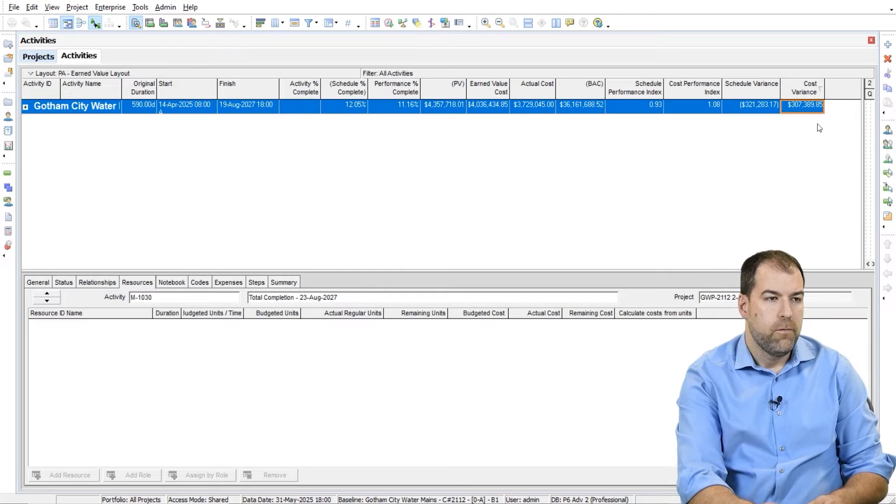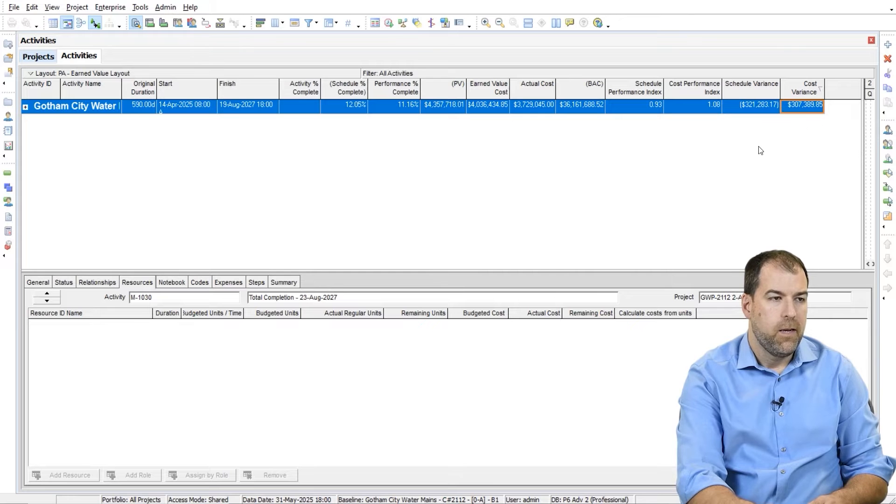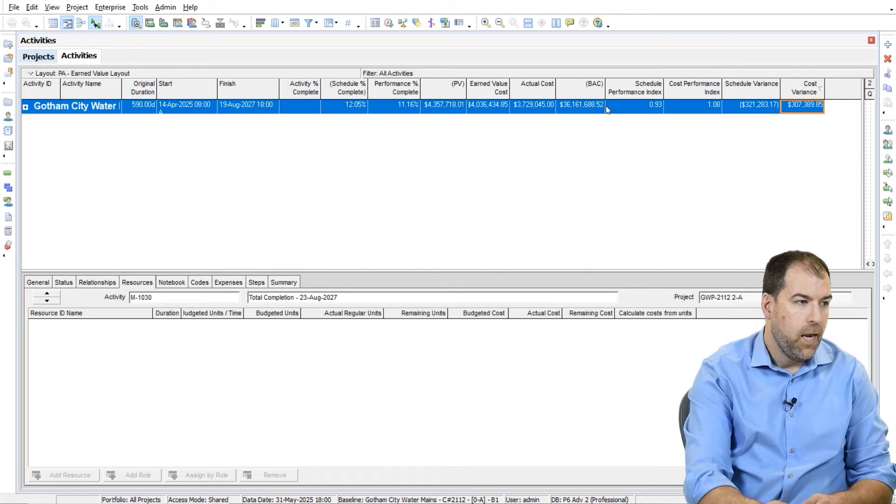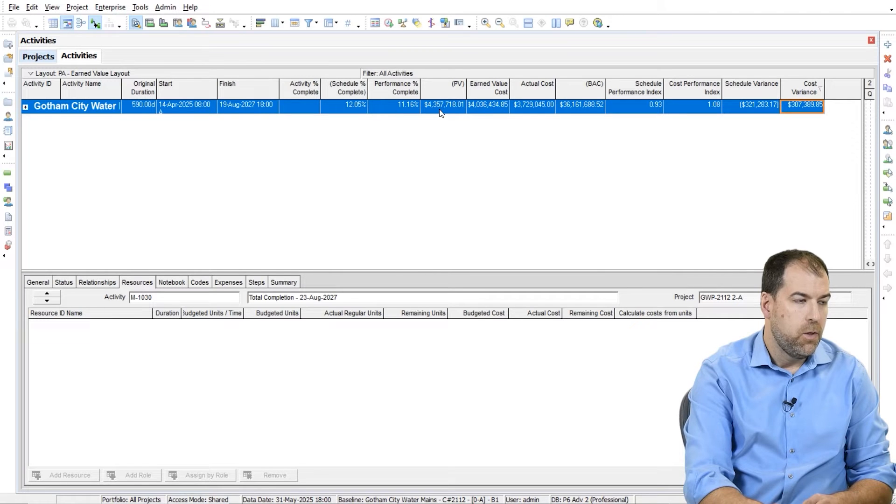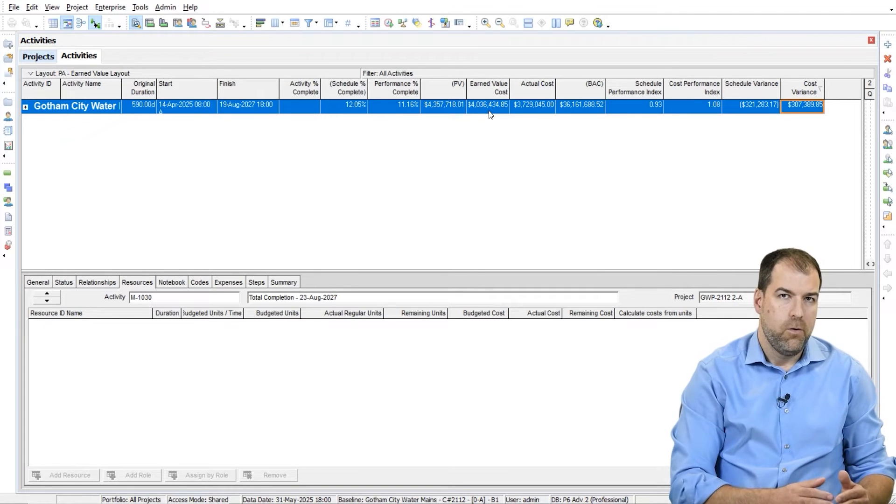Let's go to our Variance Columns to really get a feel for what's going on. And you can see that we've earned a lot, but our planned value is more than what we've earned. So we're lagging a little bit.